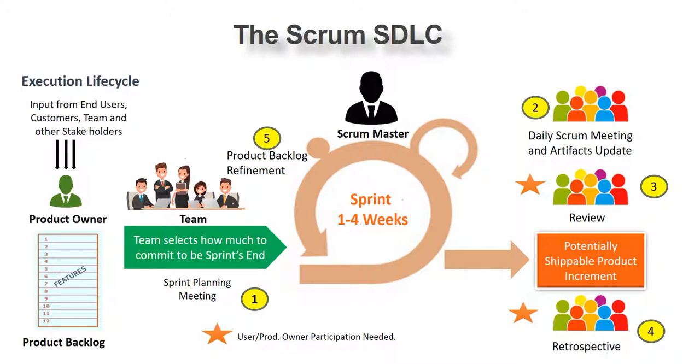The Scrum Master can be there, talking to the product owner, and the product owner would say, you know what, a new change is coming in and we need to address it. And that is where you decide that we are going to address that change in the next sprint. We are not going to disturb the current cycle, the current work that the team is doing. We are going to address the change in the next sprint.